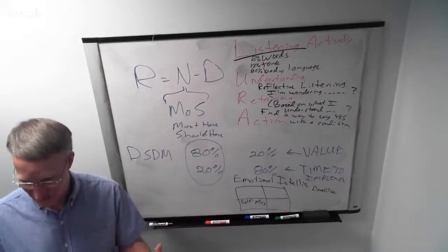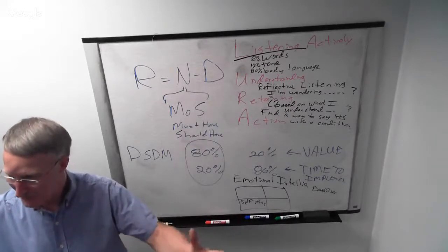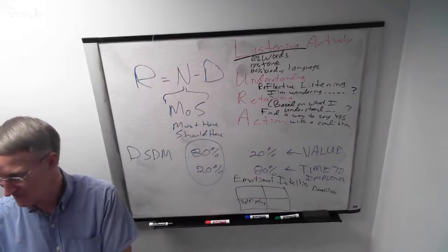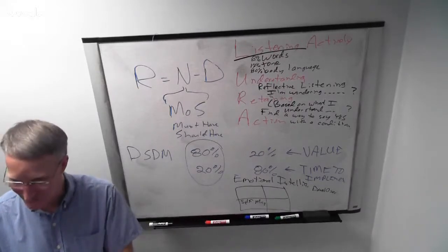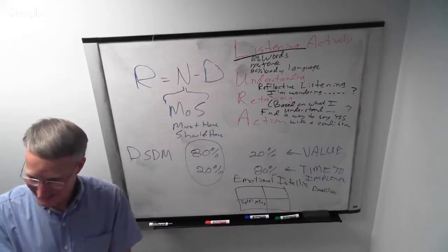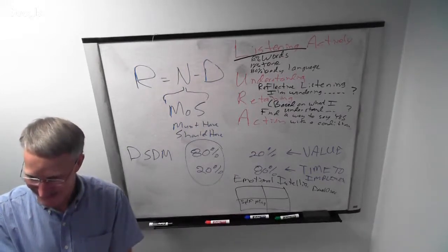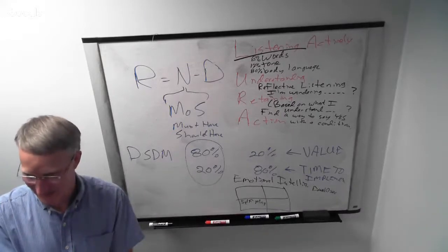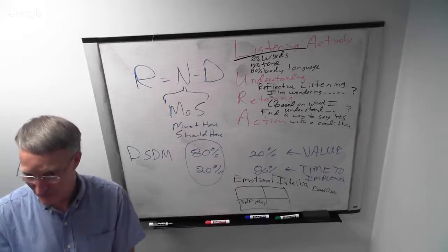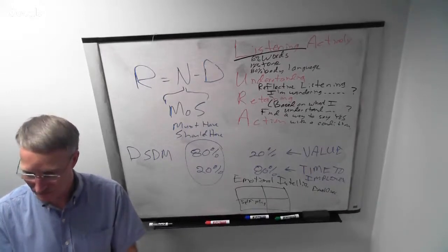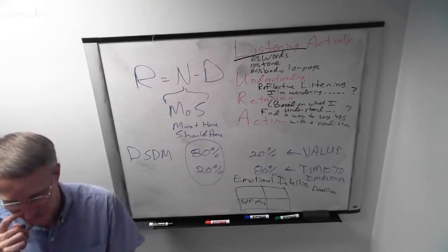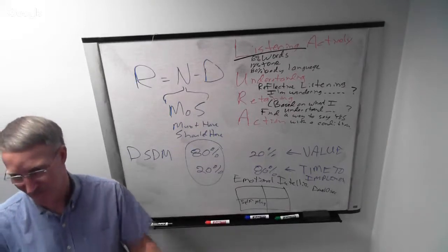In various settings, after the requirements have been elicited, formally documented, analyzed, and modified appropriately, there's that point of no return where this is what we're saying, right? Right, to avoid change management. Exactly. So there's that formal point of review where it's either I agree, or I agree only if this other condition is put in here, this other clarification is put in there. So there's always a document review.